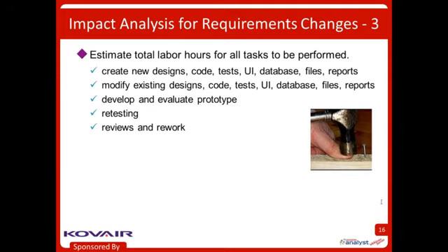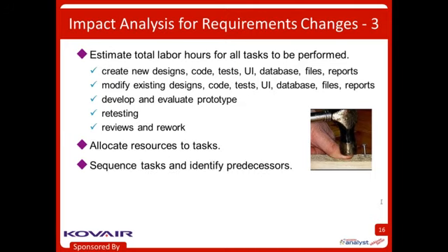So another thing you might want to do then is a little micro project planning for each of these proposed changes, so you can estimate how much work effort you might have to do for all of the bits of activities that you'll have to perform to satisfy that change. And then assemble those into an overall cost, so you can really understand how many resources it is going to take to get this work done, what order those have to happen in, just like you would for any other project plan.